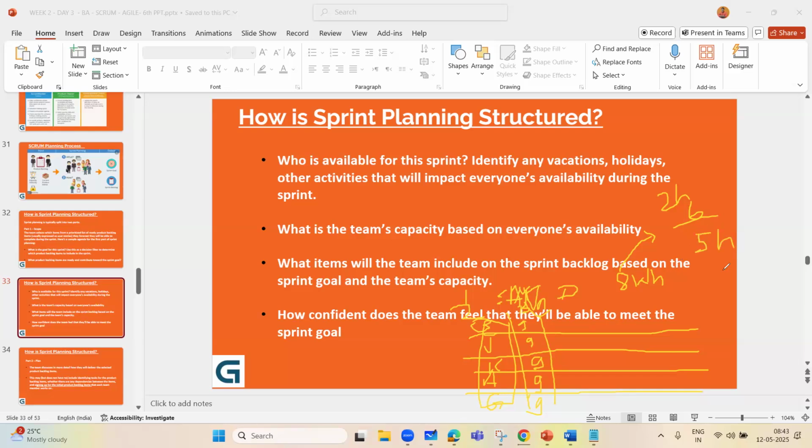You are going to work 5 hours. So when you identify the productive hours, daily everyone is going to work for 5 hours. This is your ideal workout. It means that it is when you are 100% assigned to a project. You are not a shared resource. With me so far, everyone?